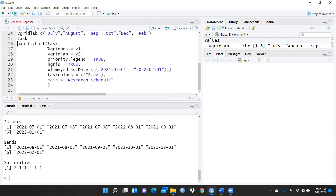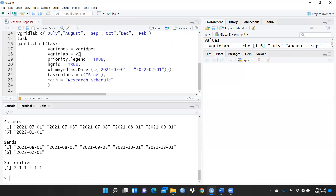Now I want to draw the Gantt chart. I use the gantt.chart function with arguments: task, vgrid.pause equal to vgrid, vgrid.lab equal to vgrid labs, priority.legends equal to TRUE, half equal to TRUE, xlim using ymd as.date with the initial start date and last date, and task.colors set to blue. Let me run this.